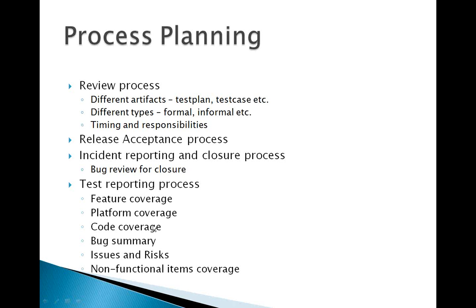How frequently should the test plan be revisited? Anytime there is any change in the project in terms of whatever is listed, let's say a change in the feature, or change in the resources or the environment, you need to update the test plan. In terms of revisiting, just to refer to it, as and when you need information which you don't have handy, or there is a dispute among the stakeholders, you can refer back to an agreed-upon test plan, because it has approval from the whole management chain.